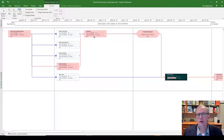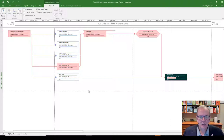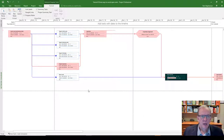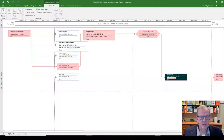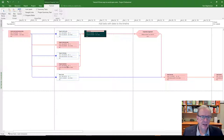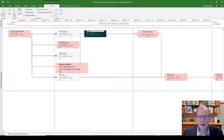You can scale the network diagram with the minus and plus buttons in the bottom right corner. Looking at it, you can see everything connected — except there's a gap right there, meaning 'Rough In Electrical Walls' is not connected. To fix it directly in the network diagram, just grab it, pull to the target activity — inspections — and let go. Now it's connected and showing as critical.